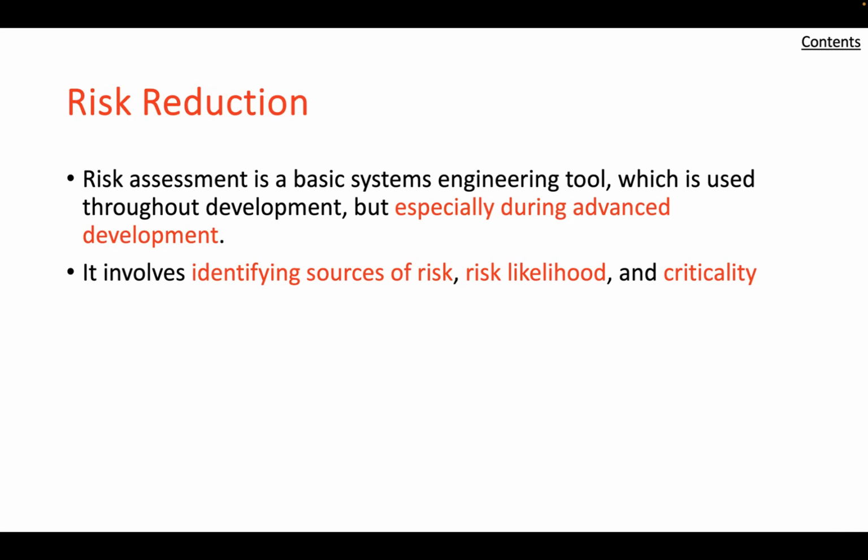Most of them are seen to arise because of a lack of adequate knowledge about new technologies, devices, or processes that are intended to be key elements in the system design. Thus, the process of risk reduction in this phase amounts to the acquisition of additional knowledge through analysis, simulation, or implementation and testing.